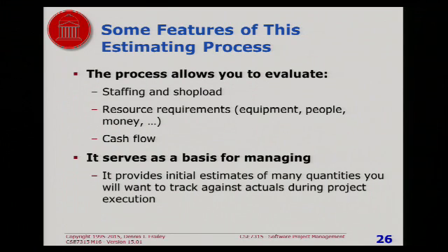One of the things that this process will allow you to do is look at staffing, or what's called shop load, which is who's doing what when. How do you assign work to people? How many people you need, how much money you need, how much equipment you need, and when the cash flow occurs. In other words, how much money do you need the first month? How much money do you need the second month? Rather than just how much money do you need for the whole project. So it's a basis for making management decisions.